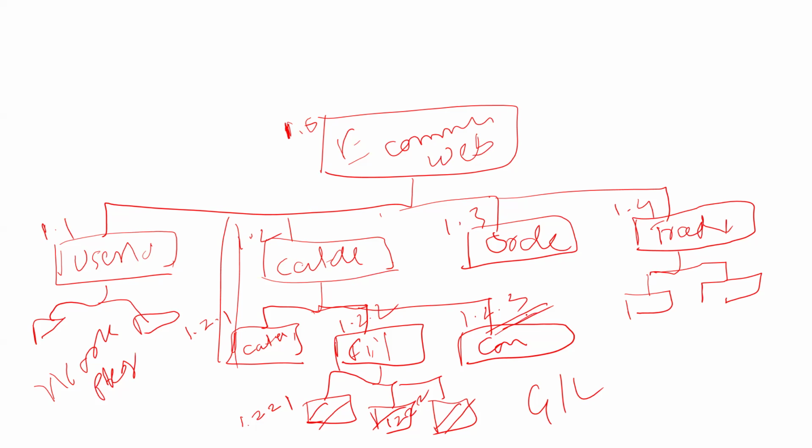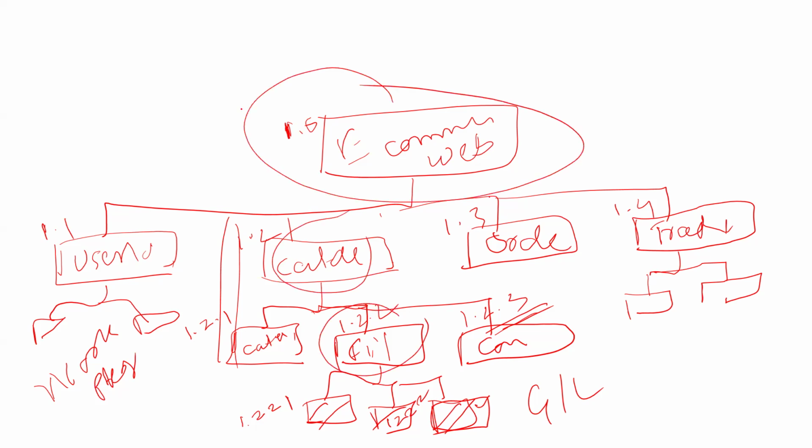So that if someone actually goes on this work package, if he has traveled from Pune to Kolkata, he will make a travel expense report, and in that travel expense he will put this code. This will automatically get mapped to that, so that it will come to this, and it will be marked to this project. Automatically it happens. That's why it is called code of account identifier. These numbers are called code of account identifier.